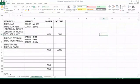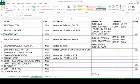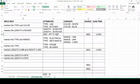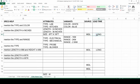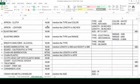In the master data, on the right side, source and lead time is also mentioned. Wherever MEL is mentioned, we are preparing it at head office level or sending people to procure it from outside, or fabricating it in MEL only. This item is blasting mat — when blasting mats are required, we supply from Hyderabad. We have our own stock; sometimes if stock is not available, we make it from waste rubber tires and then supply to sites. MEL is mentioned, and since the process is a little long, lead time is mentioned as long — minimum lead time is at least a month. So if you are planning to indent blasting mats, please indent one month before so we can supply to you in time.